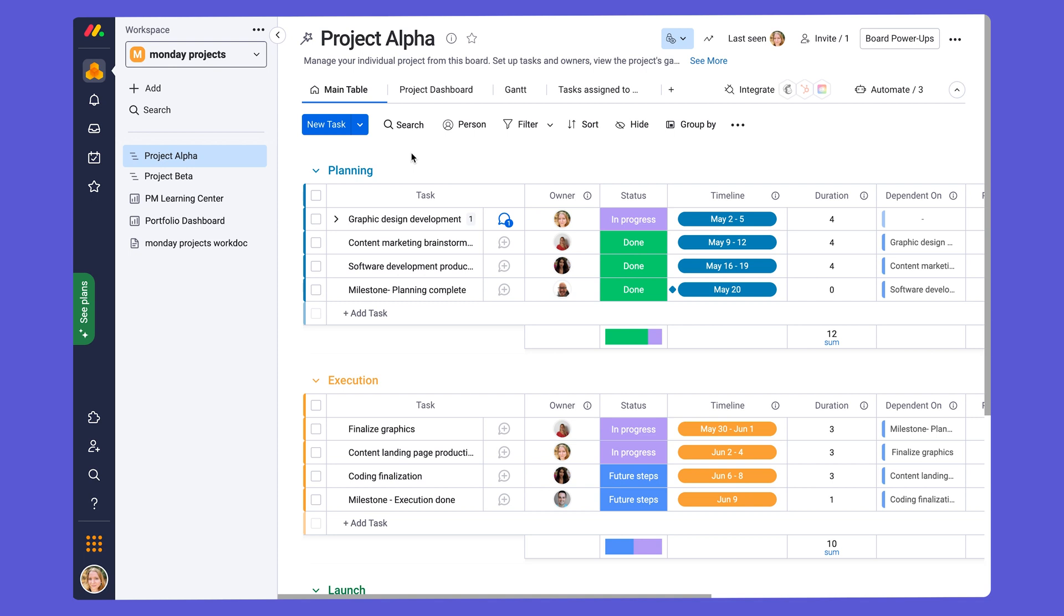Let's dive right into the first tip, collaborating with external stakeholders on your project boards. If you are working with external stakeholders involved in the project who are not part of your company, such as clients, freelancers, vendors, etc., you can collaborate with them on the board by adding them as guests.